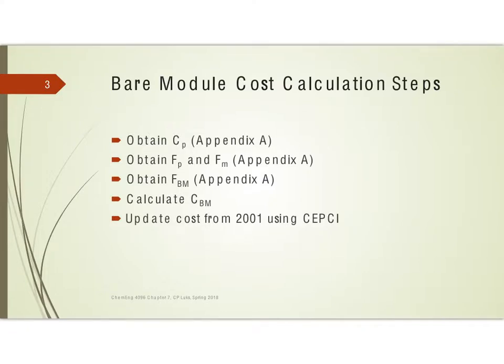The basic steps are that you're going to go to Appendix A of the textbook and you're going to find the C sub P. And then you're going to look for F sub P, which is a pressure factor, and F sub M, a materials factor. And then use that to get an F sub bare module, BM. And then use that to calculate the bare module cost. And then of course, whatever cost you get is going to be in 2001 dollars, and so update that using CEPCI values.